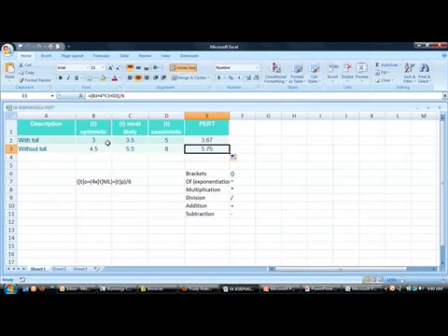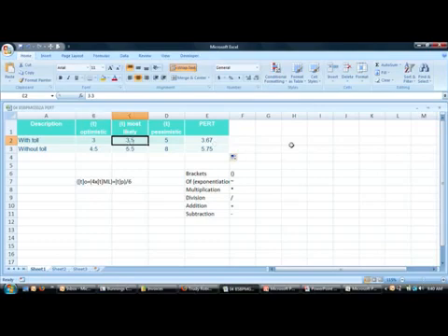So if we had the optimistic as being 3 hours, the most likely as being 5 hours, and the pessimistic as being 8.5 hours, then obviously the PERT analysis changes. Looking at this scenario, any tasks that have a greater variance between the most likely and the pessimistic are the ones that you would usually have some need to undertake a risk analysis to ensure that that particular task was going to be managed in a manner that brought it into line with the more likely or the PERT analysis, so the pessimistic view was the least likely to occur.